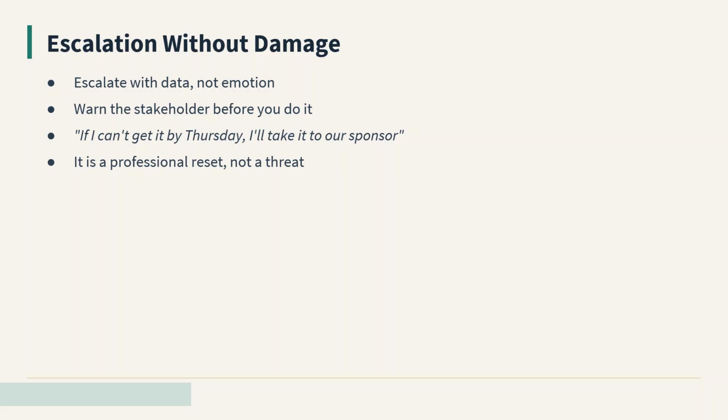A clean escalation sounds like this: I need a decision on this by Thursday, and if I cannot get it from you by then, I am going to have to take the question to our sponsor with the context I have. That sentence is not a threat. It is a professional reset. Most stakeholders respond to it by actually making the decision, and the relationship improves rather than deteriorates.